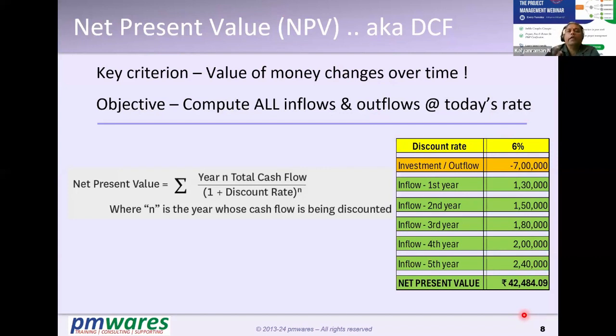And so how do I arrive at this discounting number? There are multiple benchmarks you could use. One, I gave you a simple example, is your wholesale inflation index or the retail inflation index, which is published by the central bank. You could take that. Or between you and the customer, you could agree on certain benchmarks which can be used by both of you, understandable to both of you, and treat that as a fair benchmark.